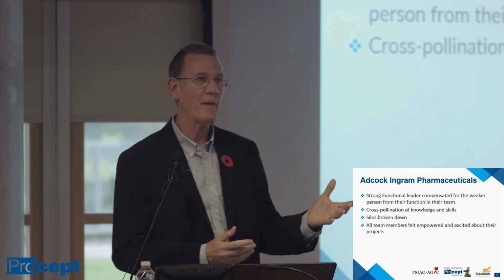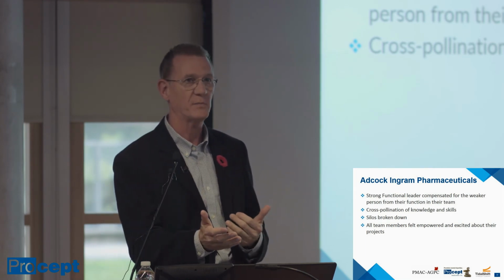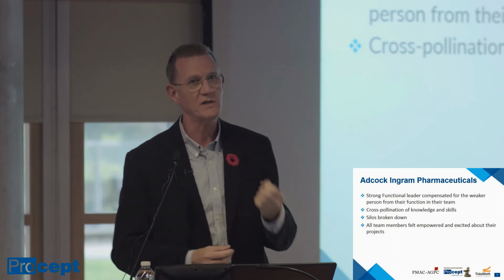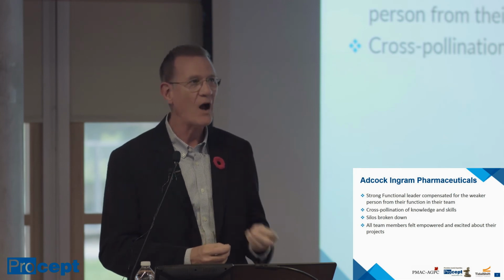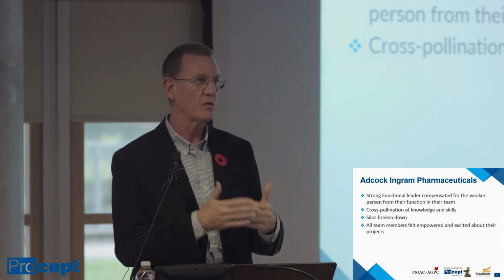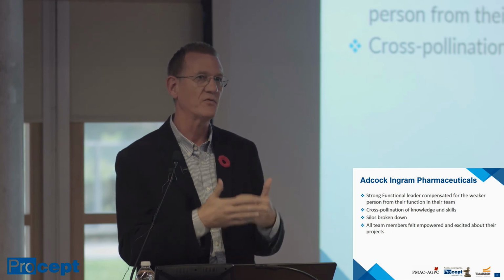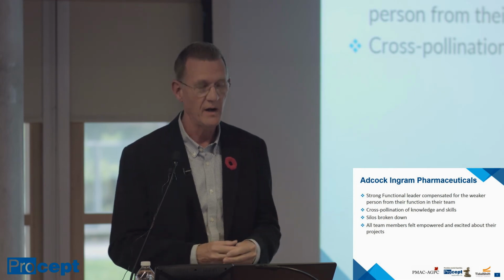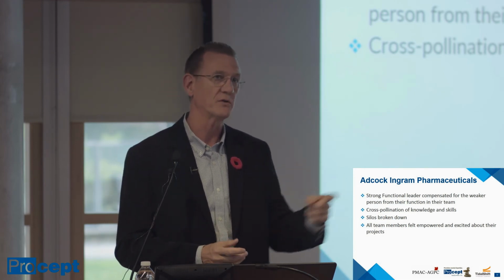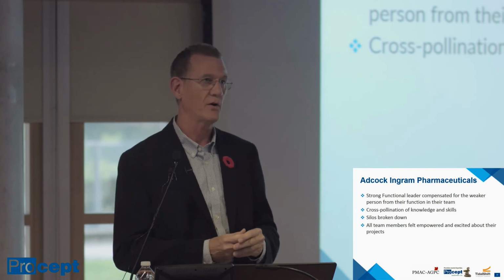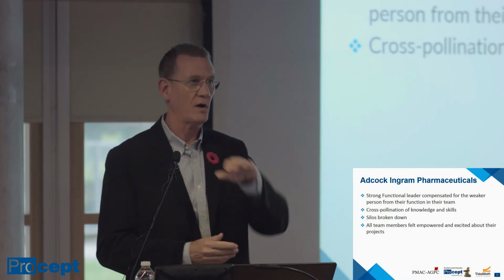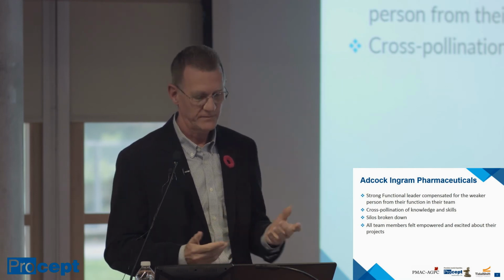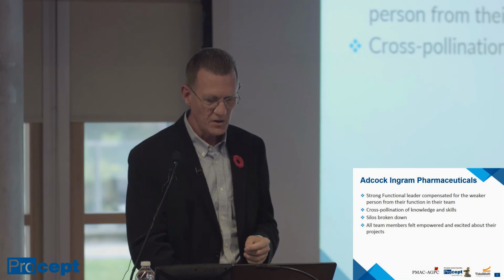They actually know something about something outside of their area of expertise. And so I grabbed a hold of that and I said to myself, this is a way that we can evaluate how teams are developing. The degree of cross-pollination that's happening is a reflection of how effective that team is. And so at some point later in my career, I actually mandated that. I said, I want to be able to walk down the corridor and ask anybody in the project team a question at this level of detail, and every person should know the answer.